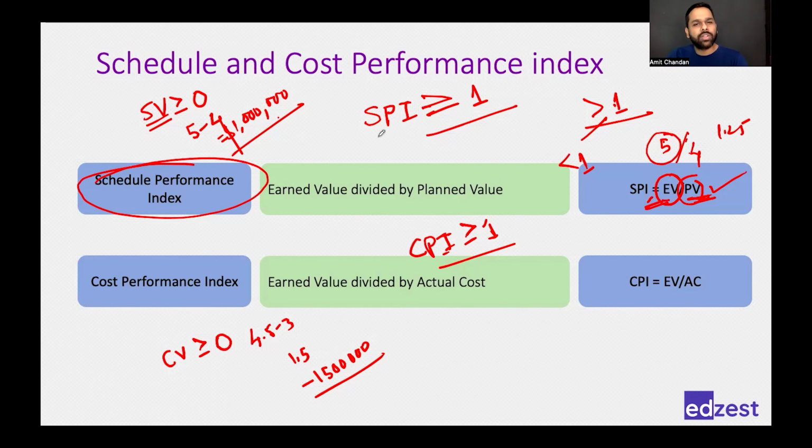But when you talk about schedule performance index, it's a division. Whatever the number, if you are doing an absolutely worst job, it will still be 0.5 or 0.4. It will not be less than that. And if you're doing a fantastic job, doing double what you had planned, the number would not go more than 2. So numbers would look like 1.1, 0.8, 0.9, 1.2, something like that.